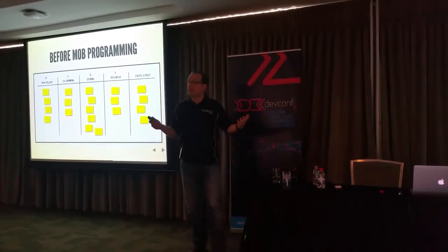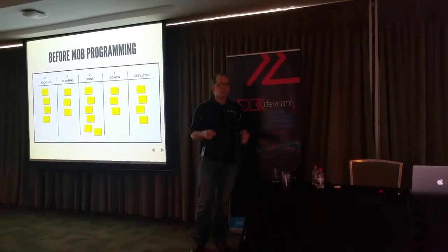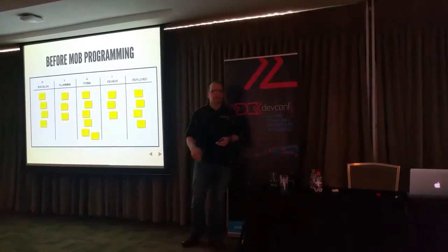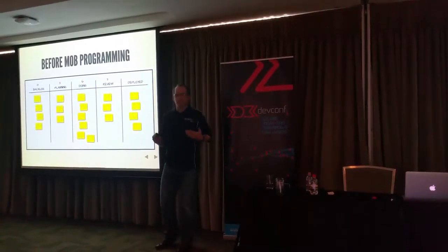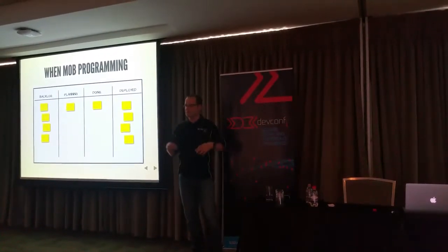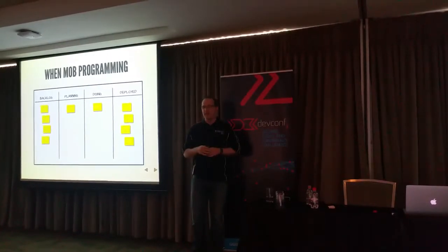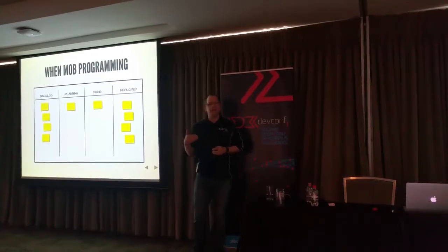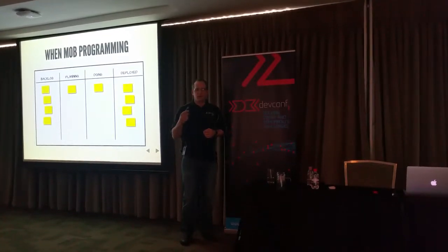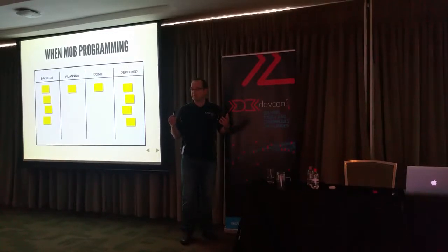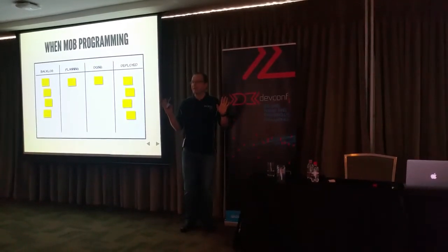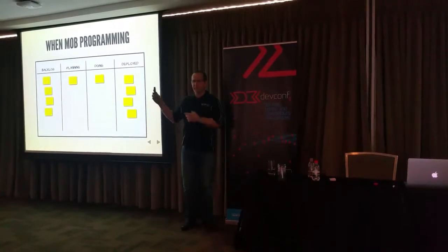In the team that I worked, we used Kanban for a very long time, and we really believed in limiting work in progress. We would beat ourselves up when we broke that work in progress limit, yet we kept breaking that limit all the time. Eventually it just got so demoralizing that one day we threw away the work in progress limits. We were just like, well, we know that reducing work in progress is great, but we're battling. Shortly after that, we started mob programming. I remember one day being in a daily stand-up, looking up at the board and suddenly realizing that our team of 6 or 7 developers was working on one thing. That just blew my mind. We'd been chasing this number for years and never been able to achieve that, and then all of a sudden it just happened without even having that number there.